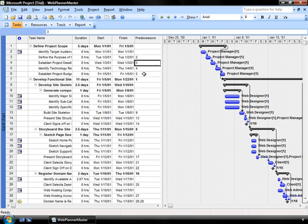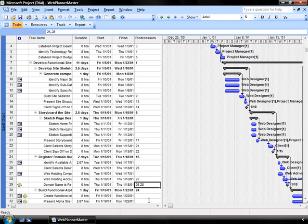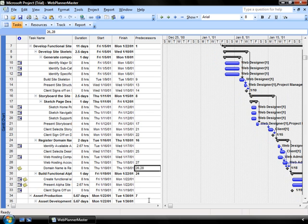Any task can have multiple predecessors or successors. Here, you have seen an example of that down in row 29. So if we scroll down the screen and see row 29, we have two dependencies here for this particular task. Both need to be completed before we can begin to release the domain name.